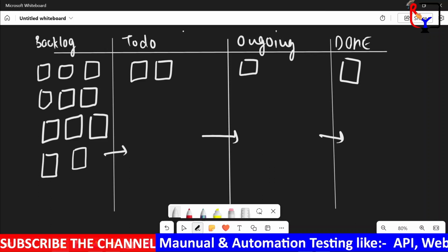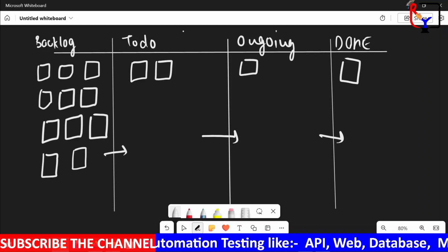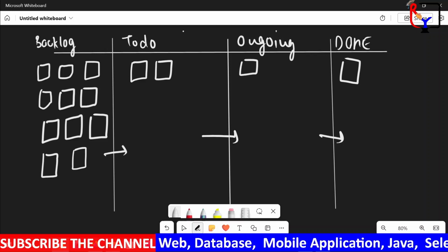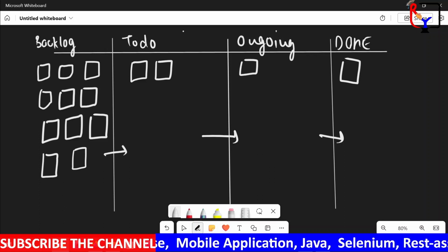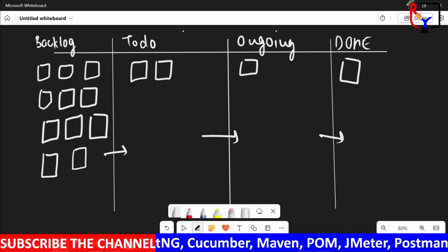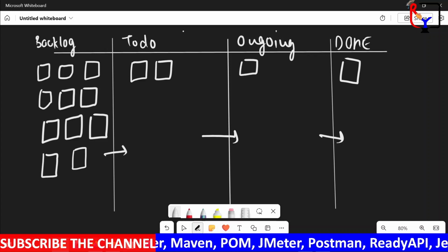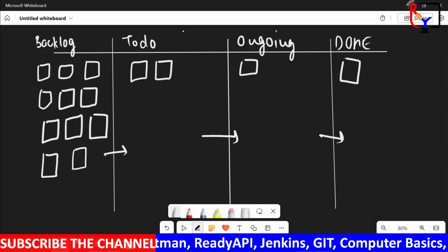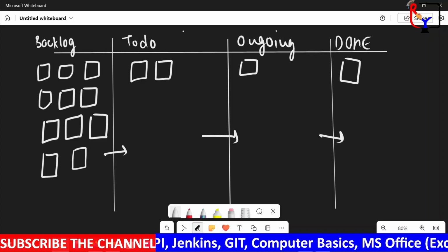So Kanban is an agile model, and the final model we will discuss. Unlike the other models, Kanban does not have pronounced iterations. If a team does plan iterations, they are incredibly short sprints, sometimes as short as one day.